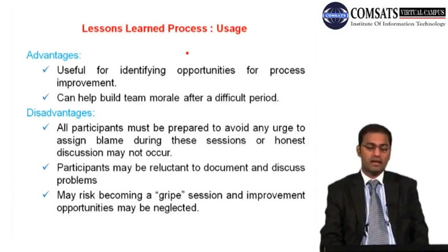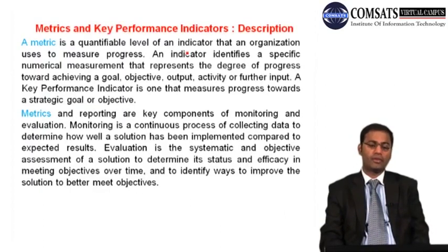And disadvantages: all participants must be prepared to avoid any urge to assign blame during these sessions, or honest discussion may not occur. And then participants may be reluctant to document and discuss problems and may risk becoming a gripe session, and improvement opportunities may be neglected. This may be another disadvantage.